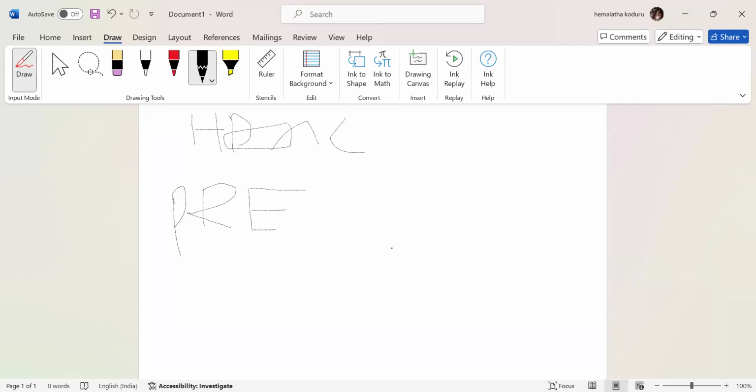Here your pre-cutover activities are balances movement, and some are number ranges. Number ranges you have to do system to system. There is no TR movement for this, so you have to do it in each and every system: development, quality, production, and master data.